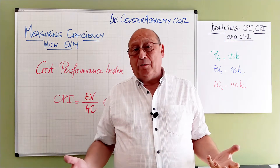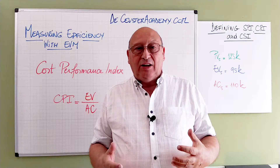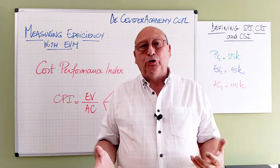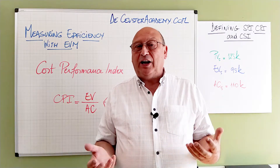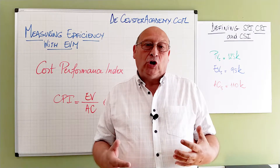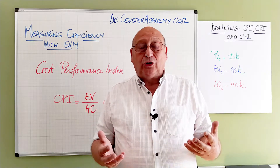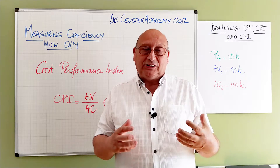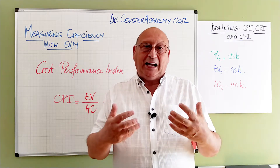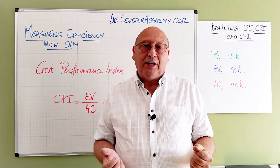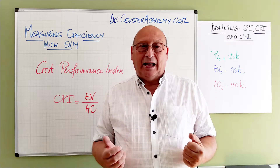The second performance index we are defining is the cost performance index. Here we are going to see how well we are dealing with money — how well are we producing the deliverables? Each time we create a deliverable, we earn the value of that deliverable, which is the cost we estimated during planning to create it. The second thing we look at is how much did we really pay to create that deliverable. We want to see how efficient we are spending the money — when spending more, my actual cost would be higher than the value I earn, meaning I'm not working efficiently.